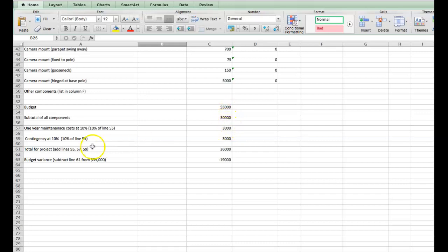So it's $3,000. You also need to have a contingency. Contingency is for costs that you didn't think about. Overruns. Somebody calls and says you spec these cameras, but they're no longer made. They're going to discontinue those. They have a new model, and it costs $300-400 more per unit. Those types of things you put a contingency in for. That'll add up for you.